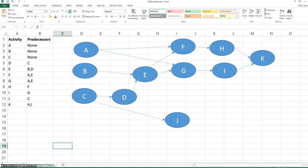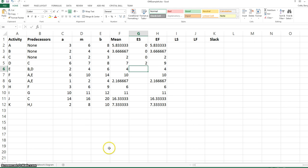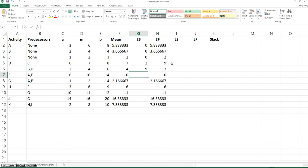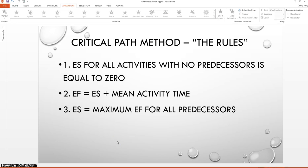Activity E has two predecessors. If we look at the project network diagram, activities B and D must be completed before E can begin. Activity B has an early finish of 3.67 and activity D has an early finish of 9. Since activity E cannot begin until both of those are completed, it makes sense that the early start time would be the largest of the two. We go ahead and set up the formula so that the model will be flexible. So the third rule is that the early start is equal to the maximum early finish for all predecessors.